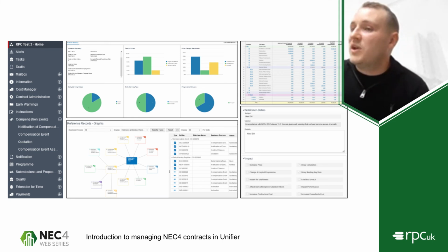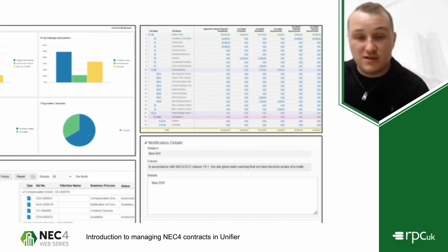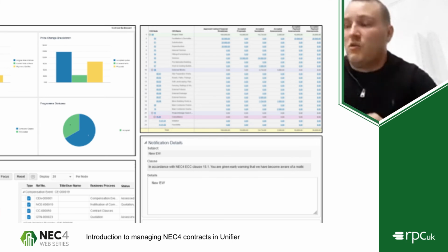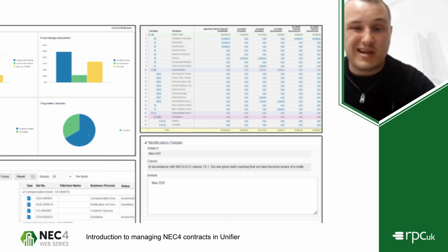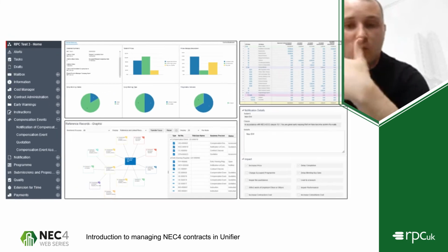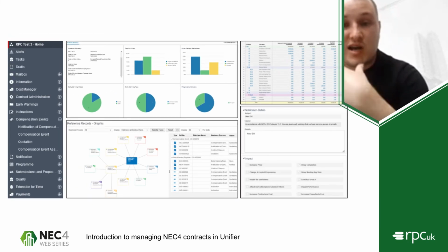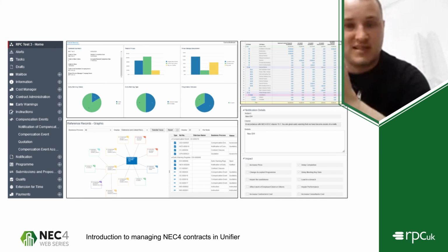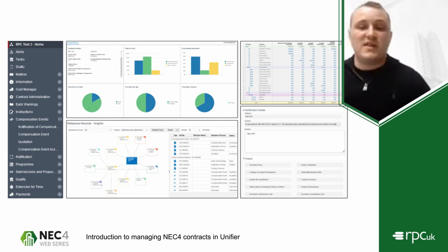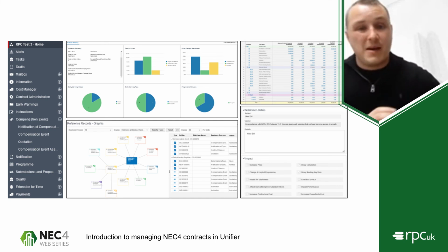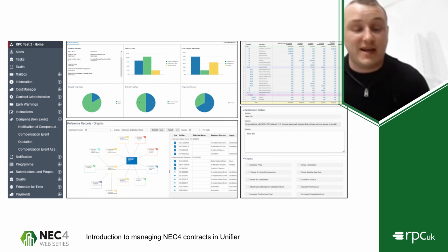So in the top right hand corner here, you can see our cost sheet. So again, this is at our contract level. What this allows us to do is, because we can have a standardized cost sheet at our contract level, when we import our contract level costs initially in terms of an activity schedule or bill of quantities at the start of the contract, we can then allocate those costs from the activity schedule and bill of quantities back to the appropriate category in our CBS.